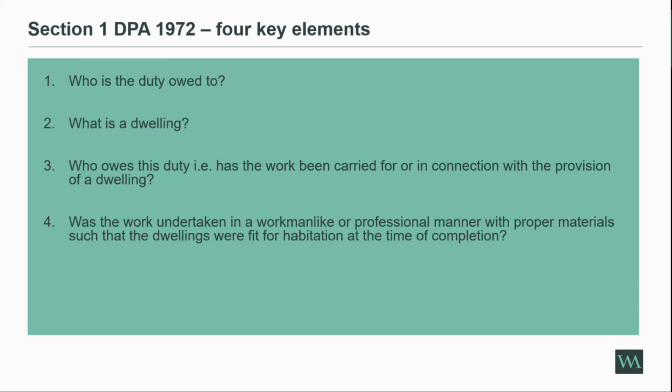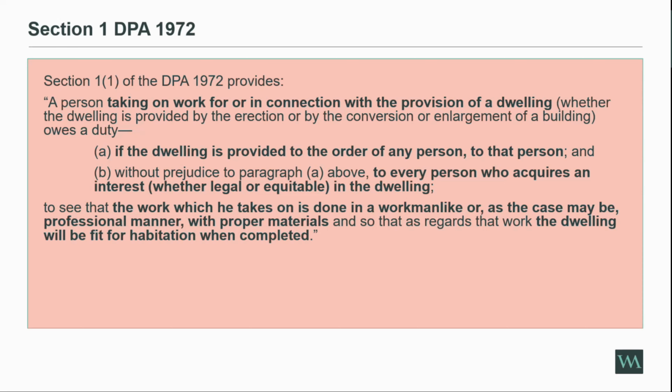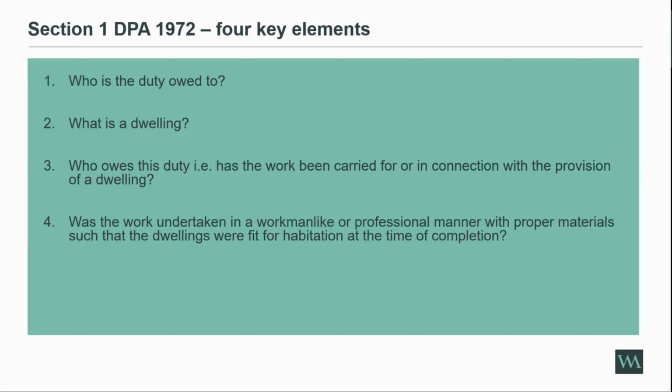However, this doesn't exclude your common parts from falling within the section, because although they don't form part of a dwelling, the common parts, such as your foundations, your structural walls, may still constitute work, and it's this wording here, work in connection with the provision of a dwelling. And it's that point that pulls in your common parts.